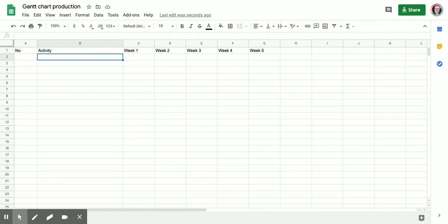Well, we'll set up marking boards, so set up profile boards. So set up profile, can't spell. So set up profile boards. If you don't know what a profile board is, then you will learn this with Jim Gantt and Gaston. It's a method of outlining the profile of the building as a permanent marker to show where all the corners are and where all the walls will go. They're usually done in timber, and they're very easy to construct, but usually the surveyor will set these out. So the first setup is really set up profile boards.